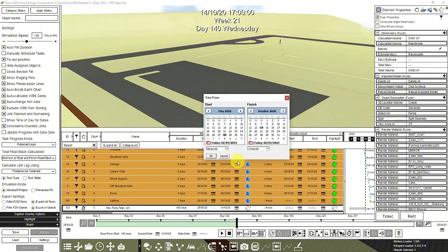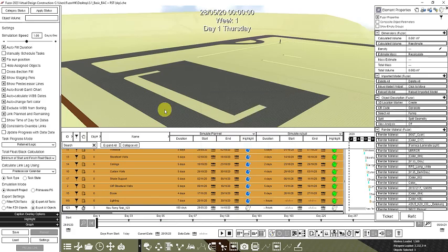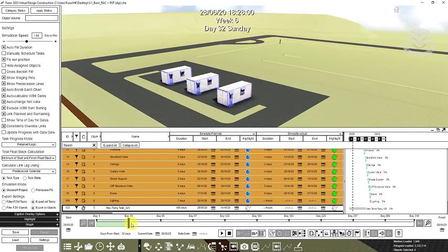So for instance, these site offices take 5 days to install. So it starts the installation on May 28, and you want to give it 5 days. So click OK, then click June 4 as the construction finish. Then click OK. Then for this calendar, the finish, we want to give it 5 days to remove. So when you click OK, demolition start is October 8. Right mouse click, then scroll the timeline to see that it will animate.